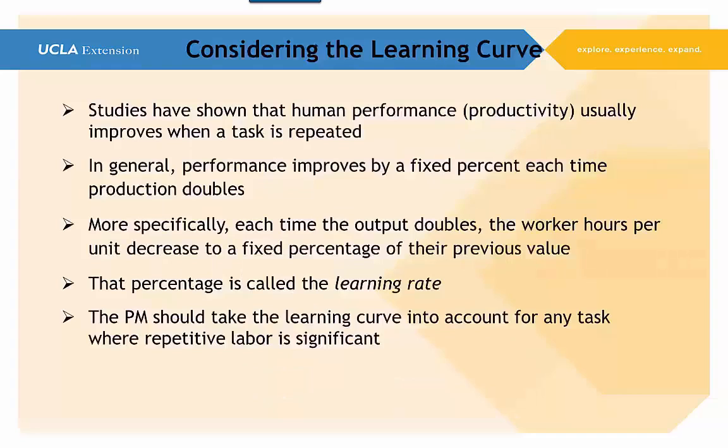As a final subject, consider the learning curve, meaning that when you're doing a repetitive task, you can improve it because you get more familiar with it. This actually became observed and known and defined and trusted and implemented in production and in manufacturing organizations where you're building a lot of the same parts or a lot of the same planes or the same radios or whatever. There is a phenomenon called a learning curve, and that is that every time you do the same thing as you just did, you have an improvement in time. Your performance, your productivity improves every time the task is repeated.